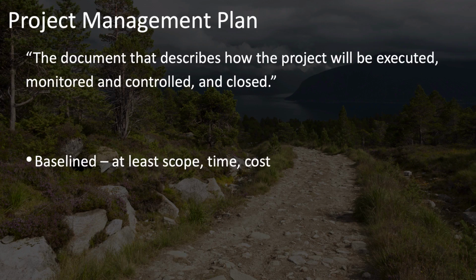However, while it's under development, it doesn't need to be baselined until it's completed. At the end of the planning process is when the project management plan should be baselined. Up until then, there's really no formal process that's required to make changes to the project management plan while it's under development. But once it is baselined, it can only be changed through the Perform Integrated Change Control process.